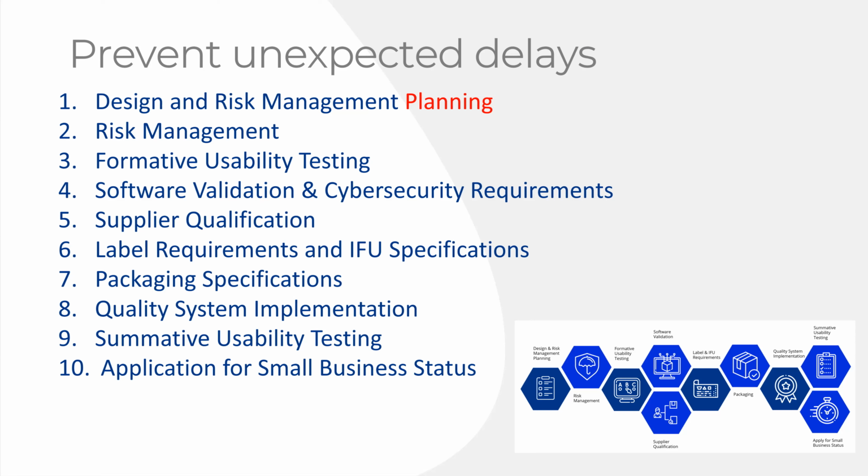So spec those packages earlier, get somebody professional, a professional packaging engineer involved in that, and have them help you with your testing plan for the packaging and validate that. So the package that you did all your verification and validation on is the final package.